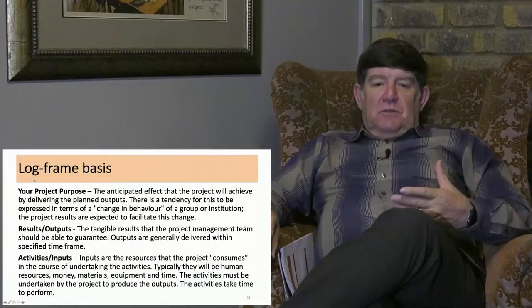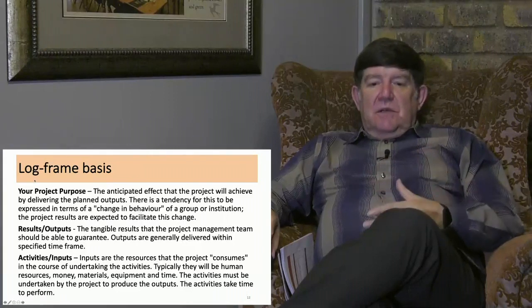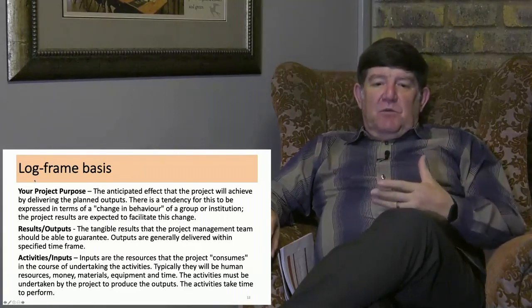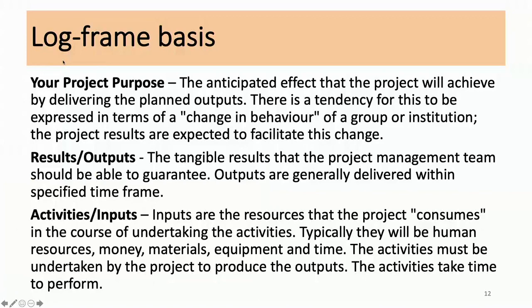The basis of your log frame is your project purpose, the anticipated effect that the project will achieve by delivering the planned outputs. The results and outputs are tangible results that the project management team would be able to guarantee to deliver. Outputs are generally delivered within the specific time frame, the 5-month duration of your project.